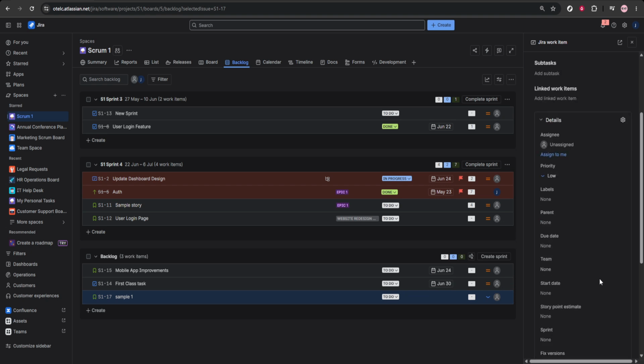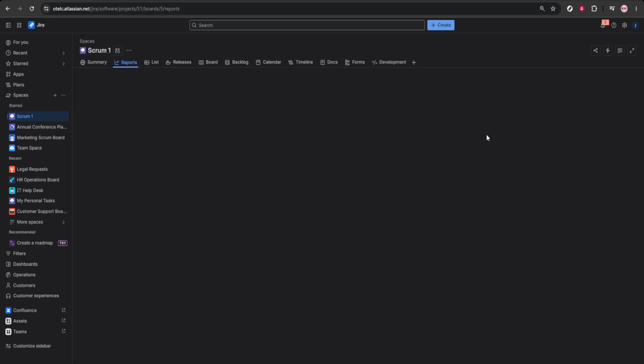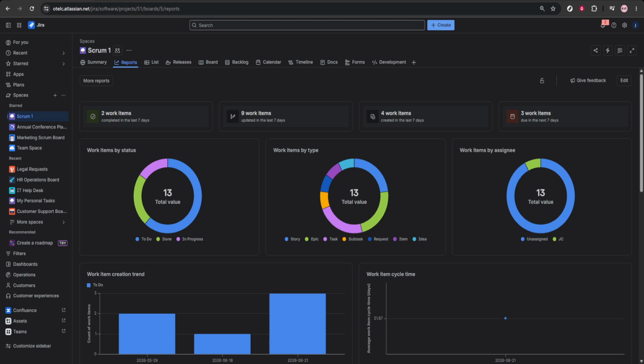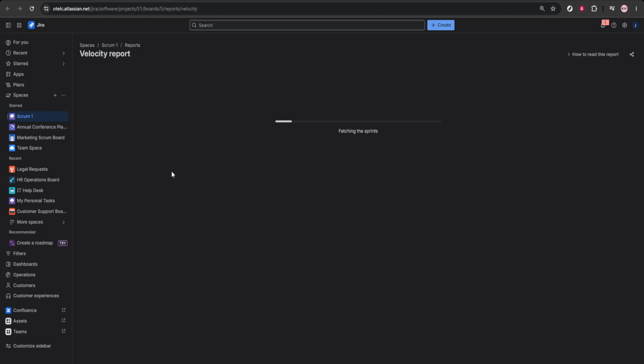Finally, track sprint progress by opening your active sprint board and monitoring completed stories. Jira reports, like the velocity chart and burn down chart, can help you see how work is progressing. You can also compare completed story points across sprints to understand delivery trends and improve future planning.